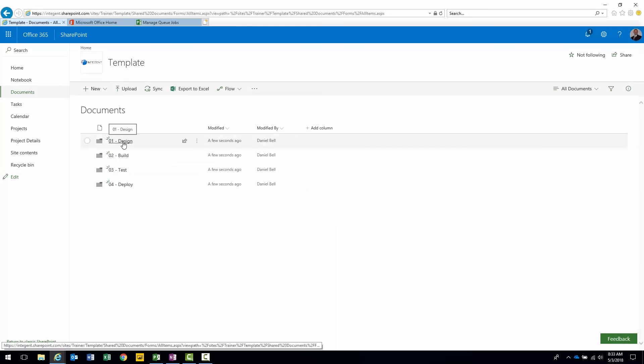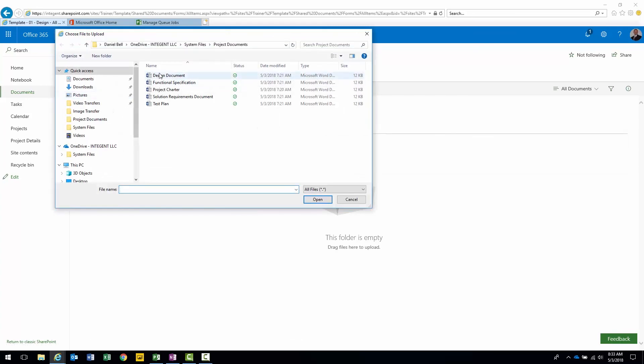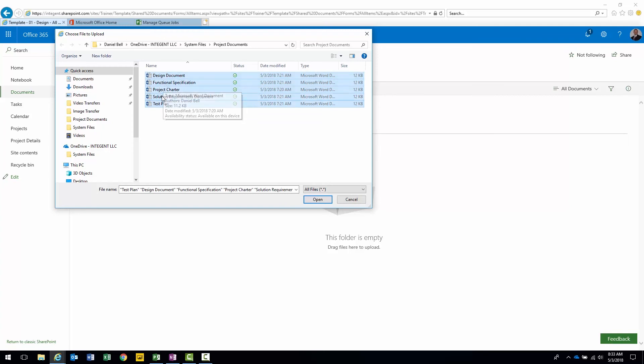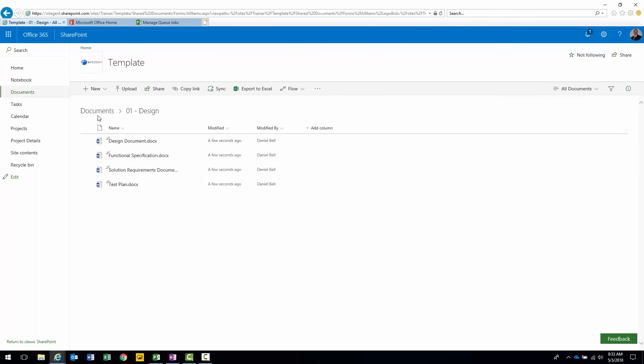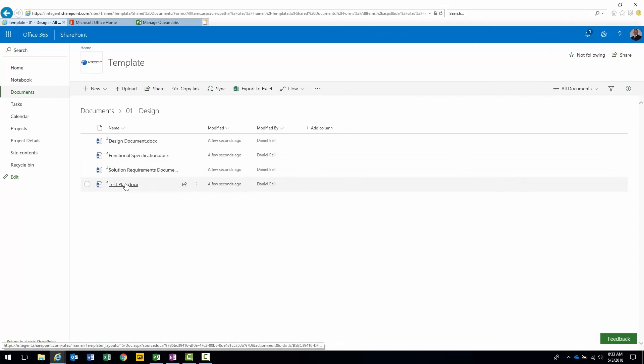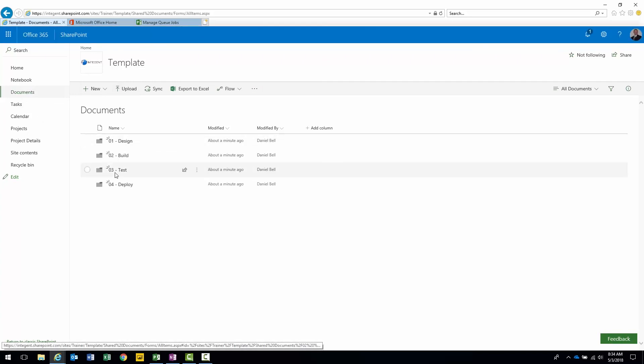Here's my Test. And then finally, there's my Deploy. The other thing I want to do is I want to actually pre-populate the Design folder with some documents. I'm going to click upload. Here are all the documents here. Design doc, functional specification, solution requirements document, and test plan. All within that library. There they are. In the 01 Design folder we've uploaded design doc, functional specification, solution requirements document, and test plan. Click back here again. I'll see my four folders. It's exactly what we're looking for. Perfect.